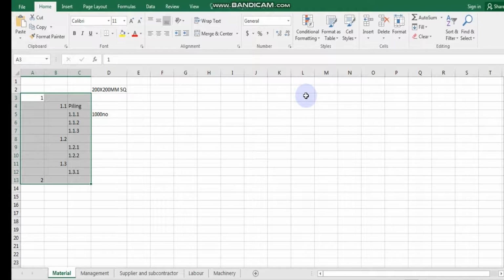So either you go by category of resources, meaning permanent or temporary, consumables and all that, or you can go by the name of all the resources that you have available. Either way, I prefer the specific ones, but the list will be very, very long actually. So once you've got this resources list, you can see how your resources are allocated to the different components of the job. So this will be your allocation.